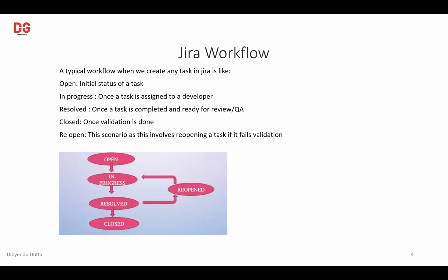And in case it is not resolved, when the QA or testing team is testing it and they feel it is not done, then they'll reopen it and move it back to in progress. So these are some of the basic workflow. We can always modify and customize them as well, but just to get a high-level understanding, this is the basic workflow of Jira.